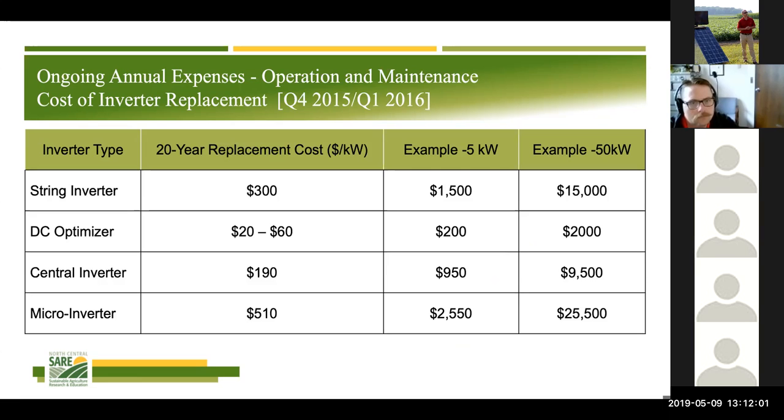And so just a way that we might rethink and a little bit more accurately evaluate these projects. And where that's really going to come into effect is when you think about looking at a payback period, a discounted payback period. As we discount future years of cash flows, adding that expense as close to the year when you're actually going to incur that expense is certainly going to be a more accurate project evaluation.